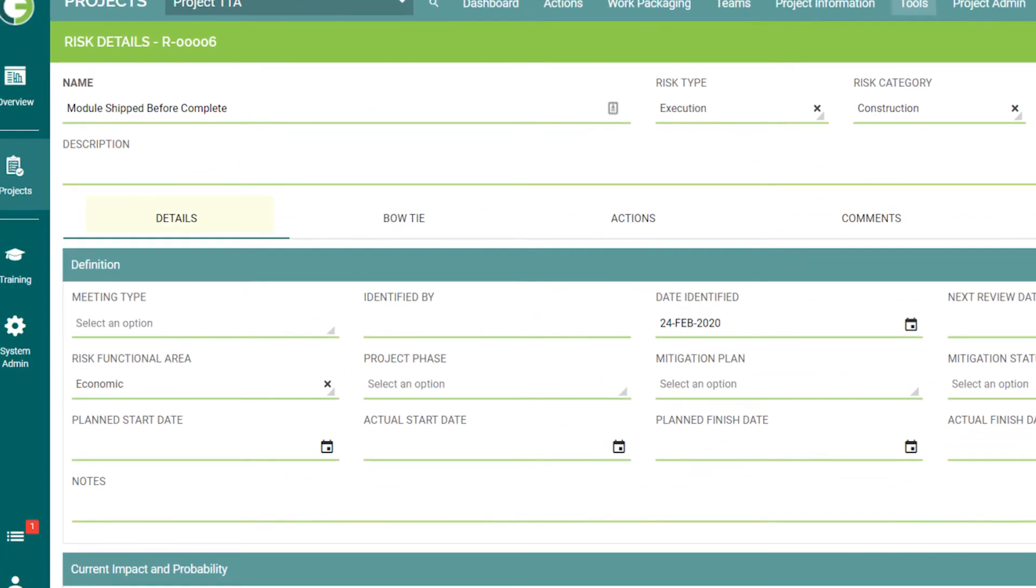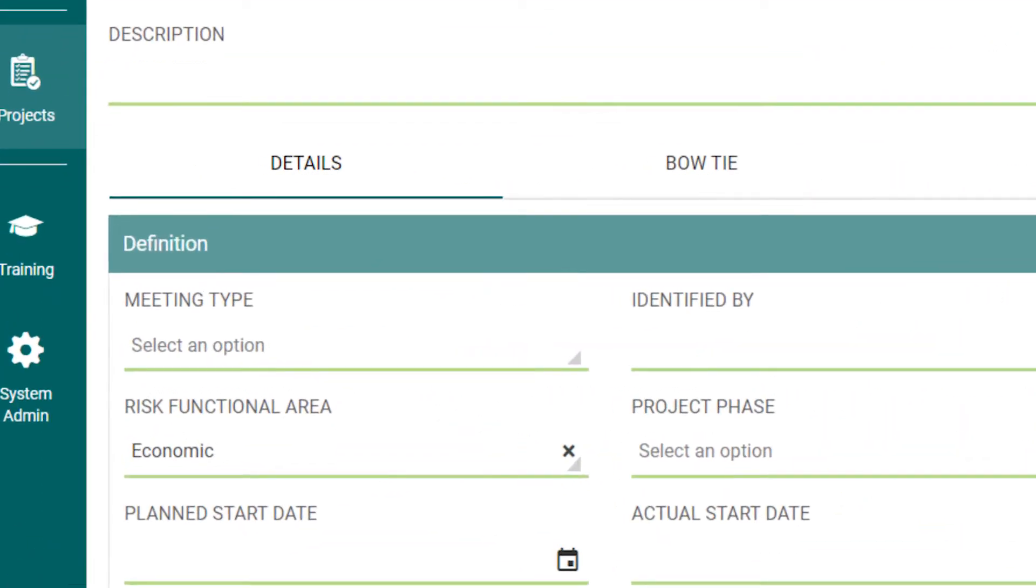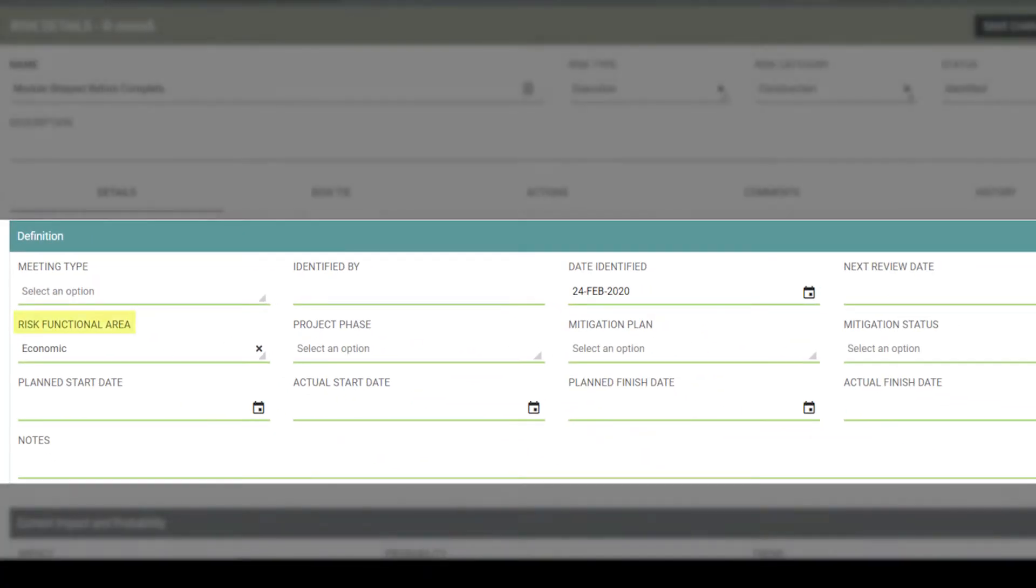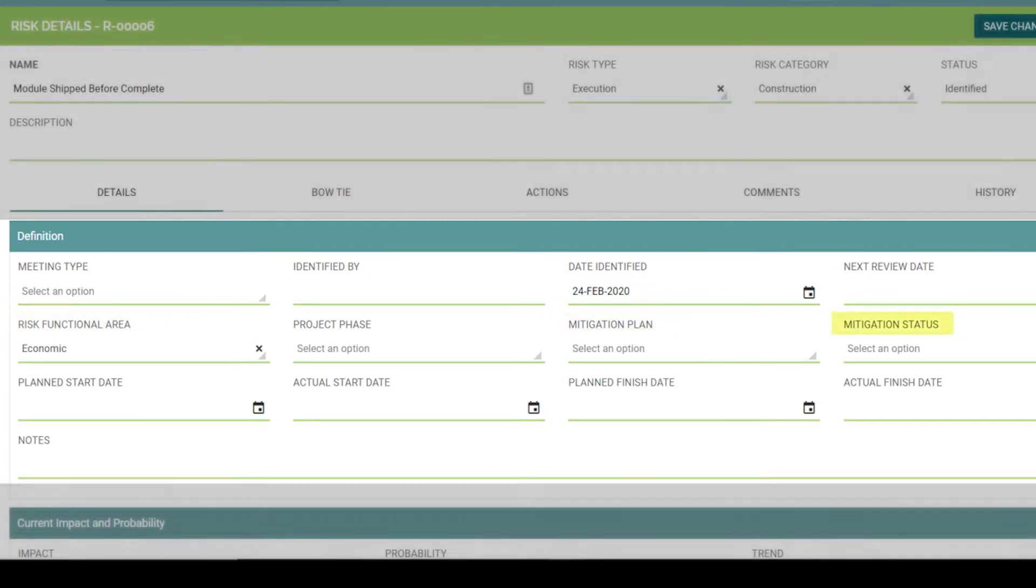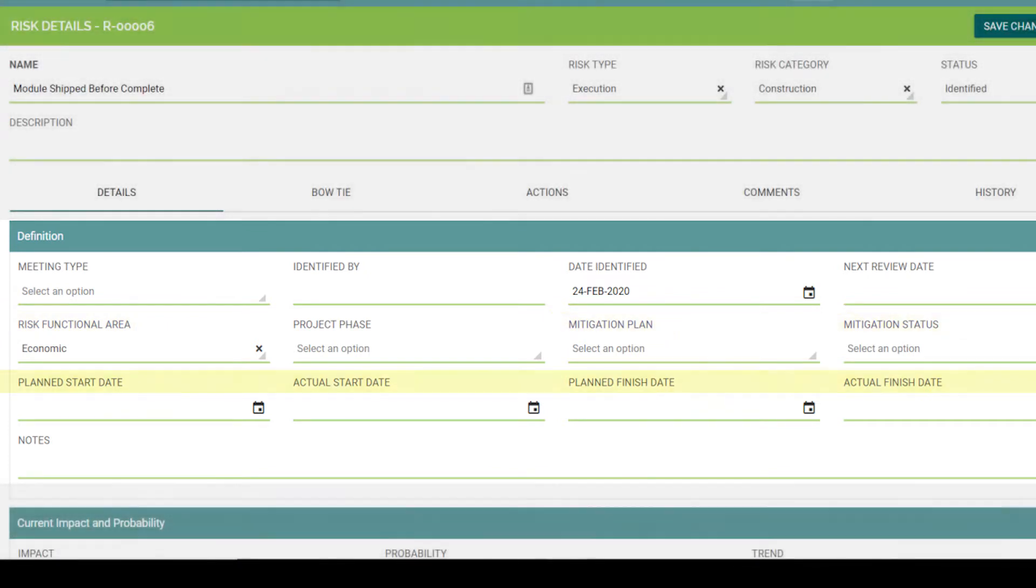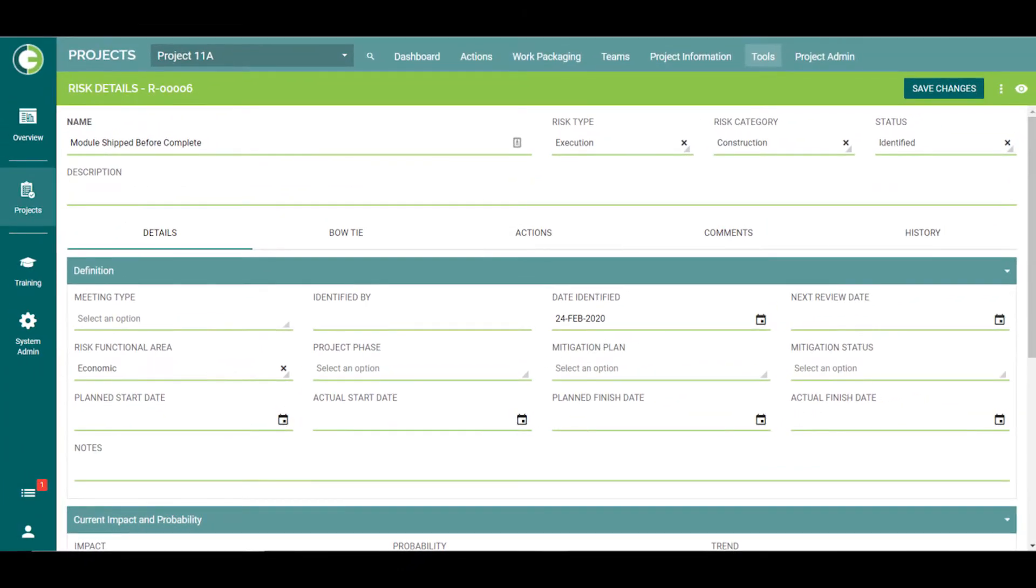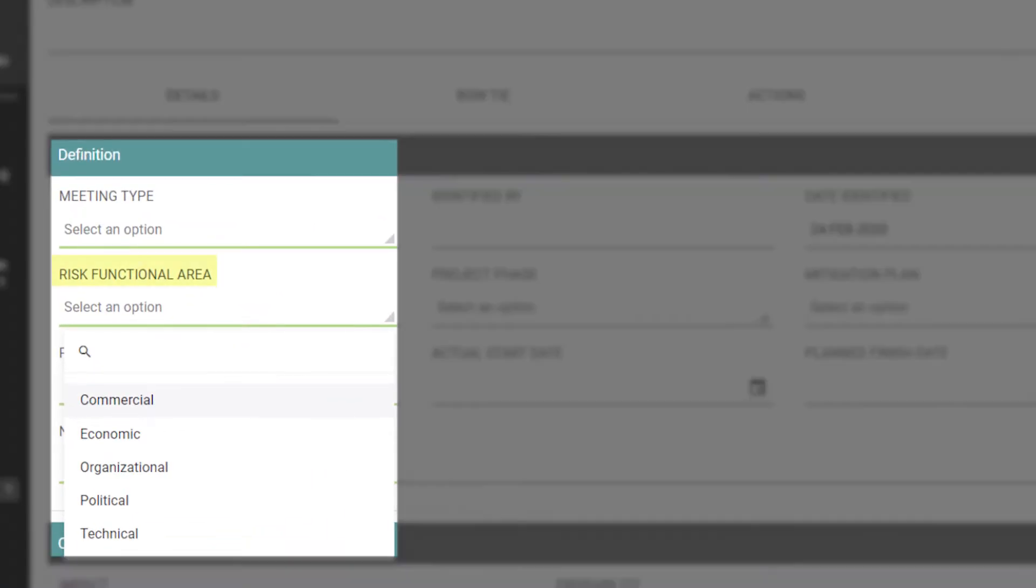Underneath the header details, you will find tabs with additional information. On the Details tab, you will find risk definitions such as risk functional area, mitigation plan, mitigation status, and start and finish dates. Let's look at each to see how to handle them. For risk functional area, this displays the functional area that this risk would affect, such as a commercial risk, technical risk, etc.